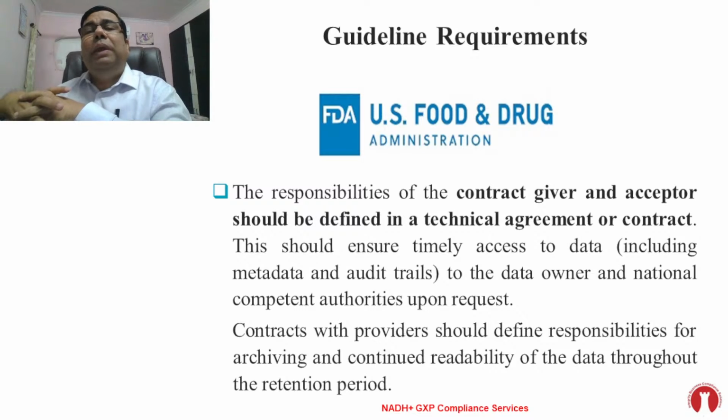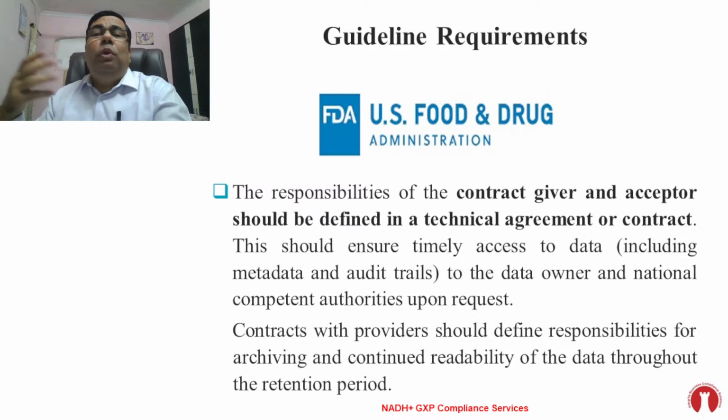So there may be a possibility that the national competent authority, or the FDA of your own country or the FDA of another country, may ask. Based on their request, you should be able to provide the data access. Contracts with providers should define responsibilities for archiving and continued readability of the data throughout the retention period. So these are some requirements by FDA, and that is the reason